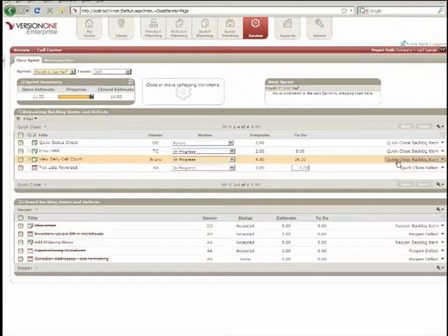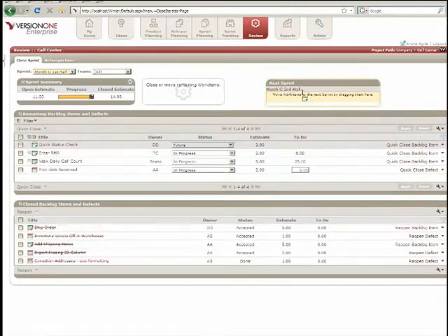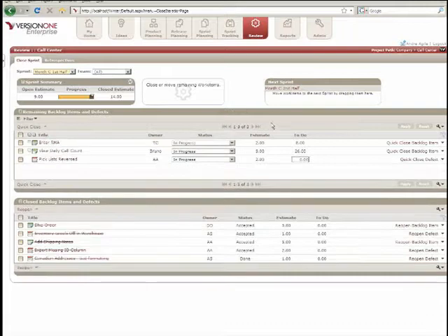In version 1, you have several other options. We don't like to see this. And remember, these next two options are the exception, not the rule, to Agile software development. One option is product owner, here is a feature or a user story that you wanted. It was quick status check, and we were unable to complete this, for this reason, that reason, whatever reason. So you need to push that off into the next iteration. We can do that in version 1 with just dragging and dropping.